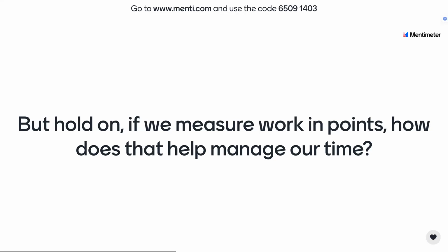our capacity. We're not going to kill ourselves working 10 hours a day, and I know some of you do that. But it's really about understanding what our true capacity is and getting as much work done as we can that meets the quality standards defined by your team. So through relative estimation, we can simplify the size of a piece of work using our experience and measuring that completion across the sprints, so that hopefully we can get a better understanding of that velocity, to forecast future work as well.